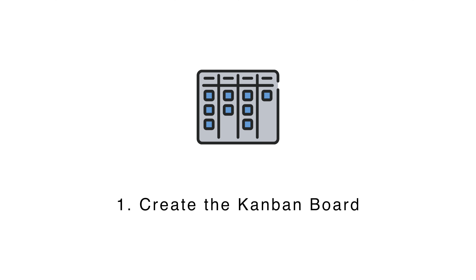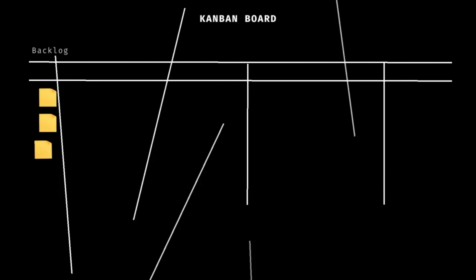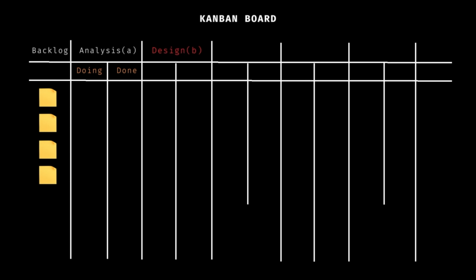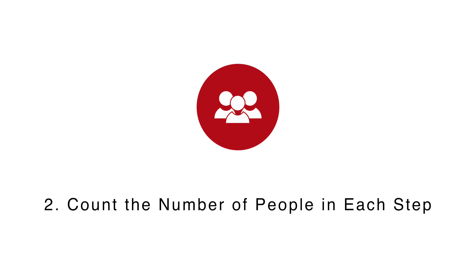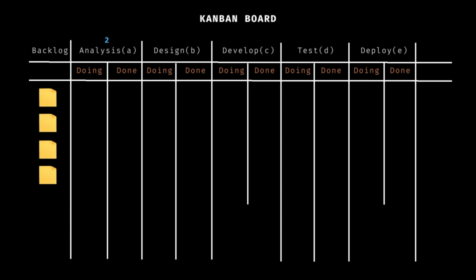First is to create a Kanban board. Let's say your team creates a Kanban board with five columns: Analysis, Design, Develop, Test, and Deploy. The second step is to count the number of people working on each column in the Kanban board. This helps us estimate how much work each column can handle. For example, let's say there are two business analysts in the analysis column, three UI/UX professionals in the design column, four developers in the develop column, three testers in the test column, and one person handling the deployment. When lacking performance data, a good starting point is setting the initial WIP limit for each column equal to the number of team members working on that column.